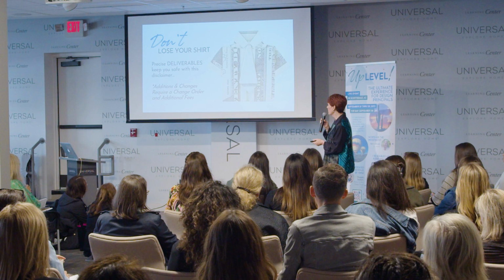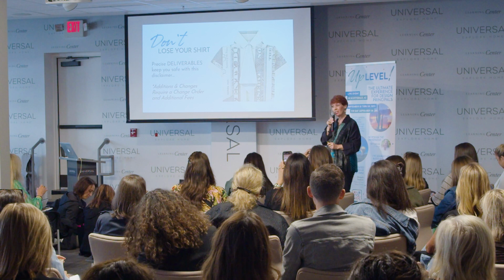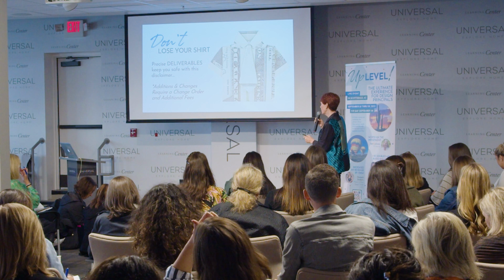So don't lose your shirt. Precise deliverables really matter. This little disclaimer clause is vital at the bottom of your deliverables in your letter of agreement: additions and changes require a change order and additional fees. That's like your get out of jail free card. If you forget that, you are on the hook. Do not forget that. That changes everything. So here's an